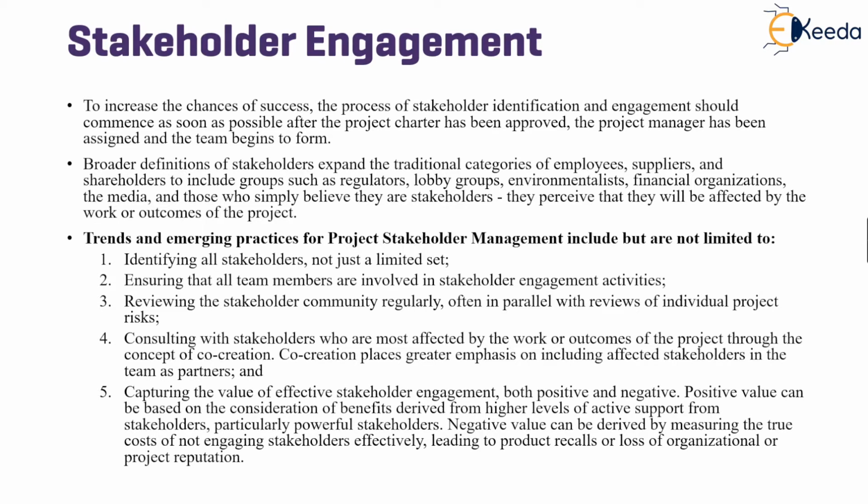Hence, the trends and emerging practices for project stakeholder management include, but are not limited to, identifying the stakeholders, which is not a limited set as we have seen earlier, ensuring that all the team members are involved in the stakeholder engagement activities, and reviewing the stakeholder community regularly and often in parallel.